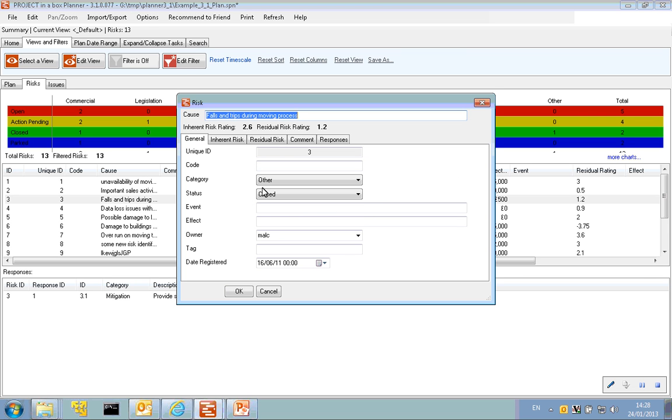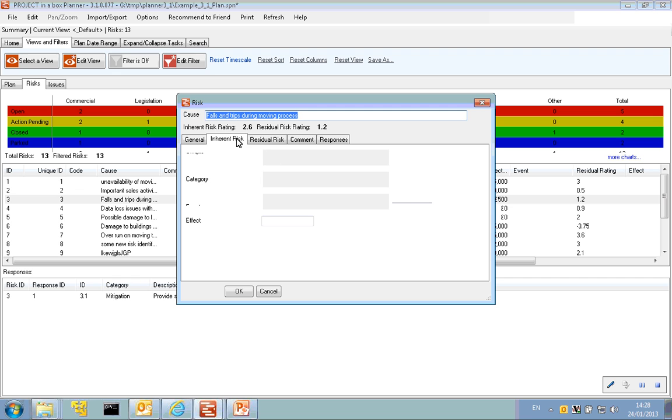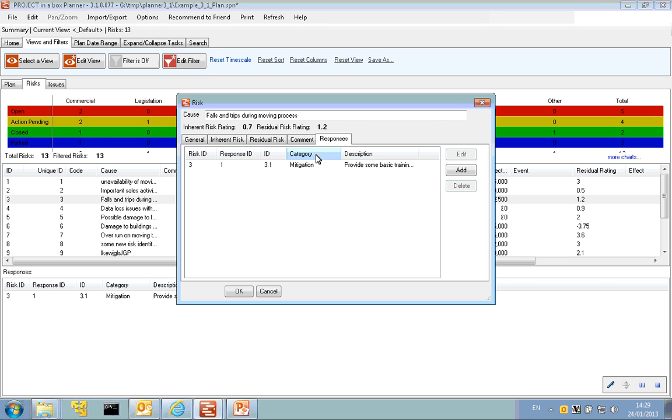We simply click on the risk to set it up with its description. So we've got cause, event and effect. If we want to use those as well, we can categorize them, and all these categorization status options, the things that drive the calculation of the risk significance, the rating of it, inherent or residual, are all available to be customized. Very simple to use. You just simply drag on the scale, but you can customize how these calculations are all set up. Again, it uses commentary fields, or you can manage responses if you want to manage your risks in a more formal way.